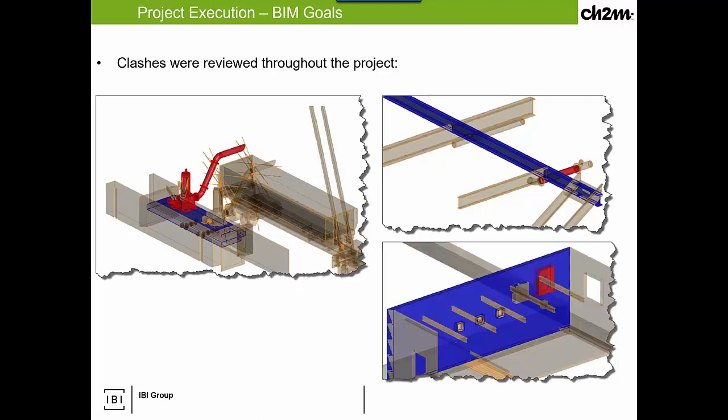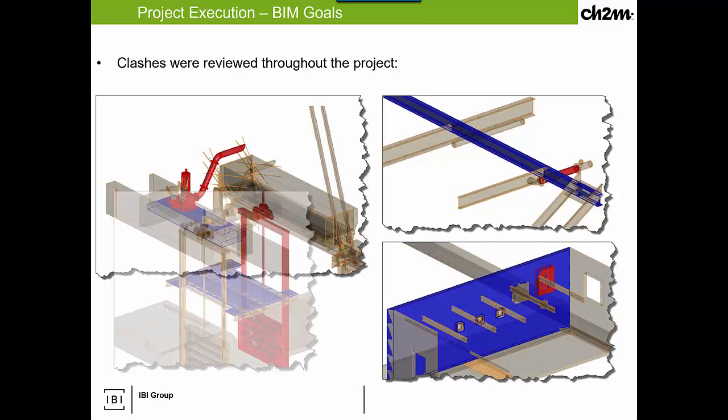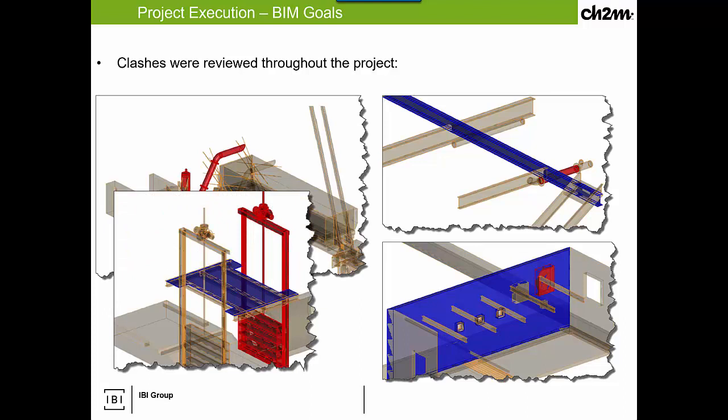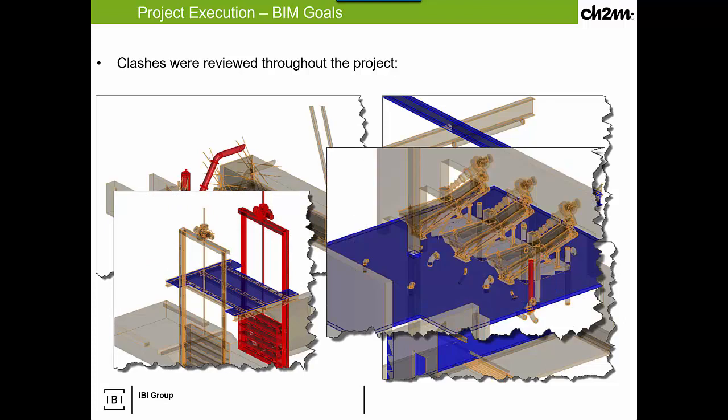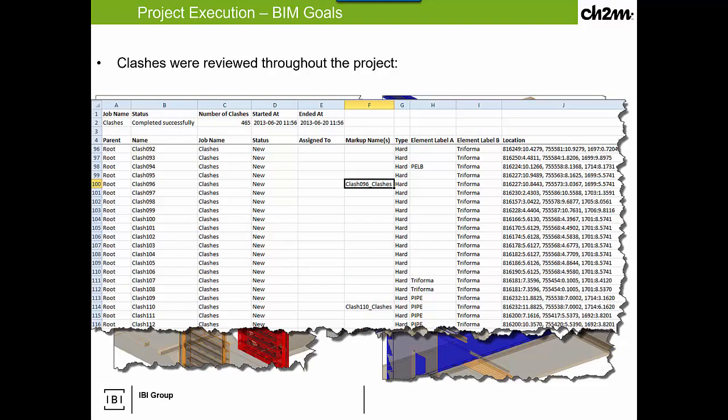A lot of the clashes were based on process equipment relative to building components. Those are the main clashes that were analyzed. As I've said in the past, with these heavy industrial projects, these equipment pieces are usually the heavier or larger pieces that have to be analyzed or that are of a greater cost, and therefore any clashes with them will have a larger detriment to the project. So we tracked the clashes, analyzed them, and then communicated accordingly.